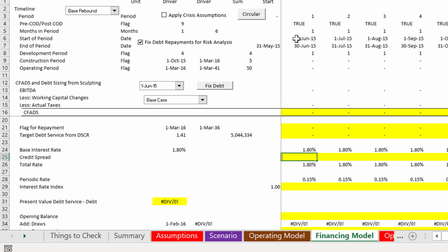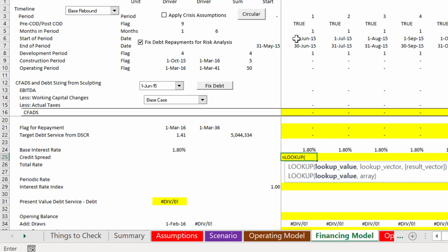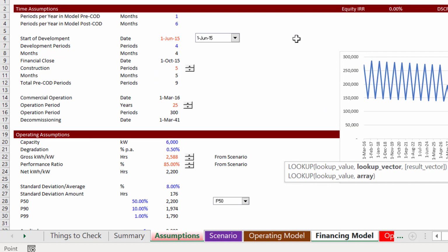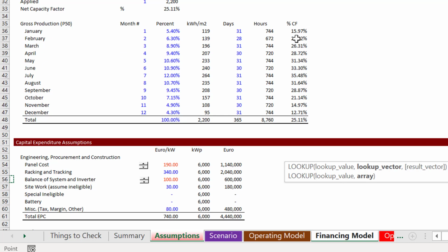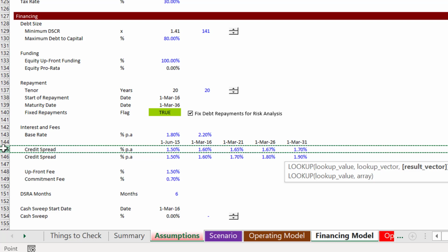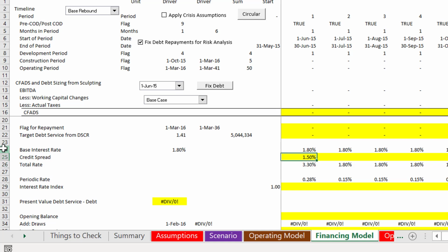And then we have to remember this credit spread, and here's another thing I'm going to moan about. I hope you don't yell at me about the coloring; you can just send me one of those little comments. But when you set up these things, I have seen 9 out of 10 people, when they set up the credit spread, they will not put it side by side. They'll put it down, and then you're going to have to make some long calculation for the credit spread. And then our total rate is the credit spread plus the base interest rate.